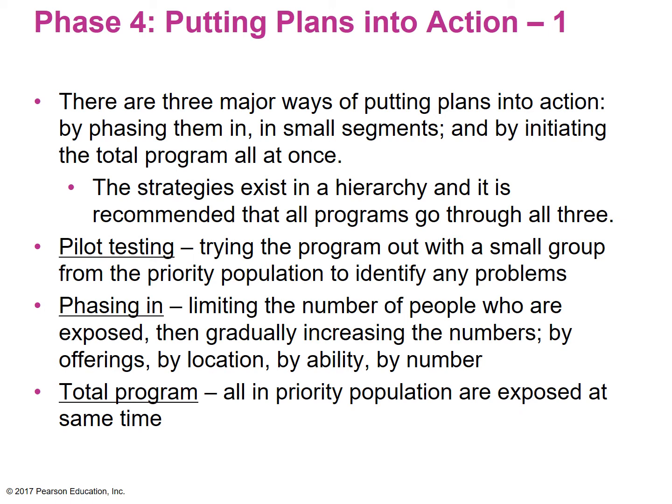But just realize that pilot testing is going to consume resources, right? It's going to consume time right off the bat. It has to occur before actual implementation. You're going to be utilizing resources to implement this pilot test. So you have to go back and reconcile against your budget and say, do I have the necessary resources to facilitate a pilot test? That's going to be a case by case type of thing, or maybe you plan on pilot testing from the beginning and you incorporate that into your budget request early on, and you can kind of address those things.